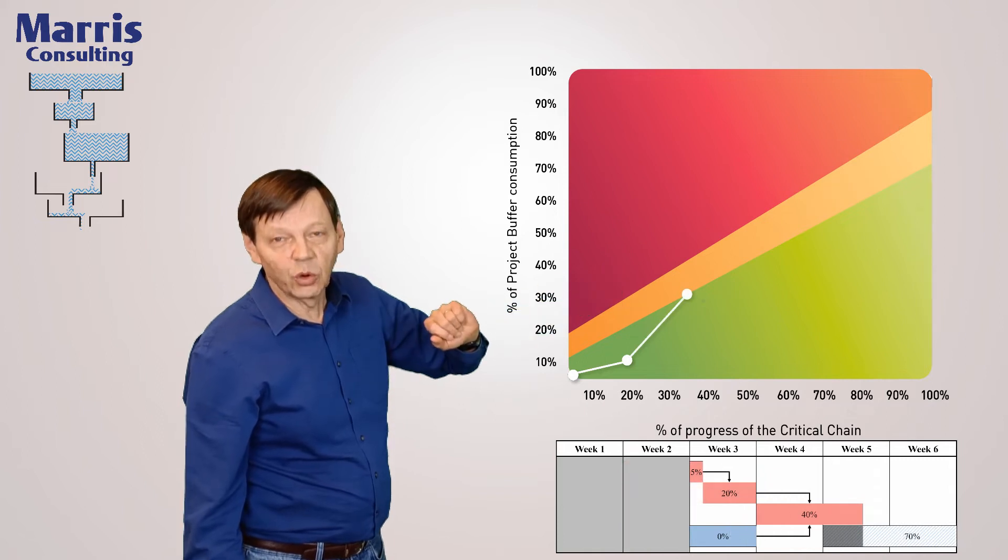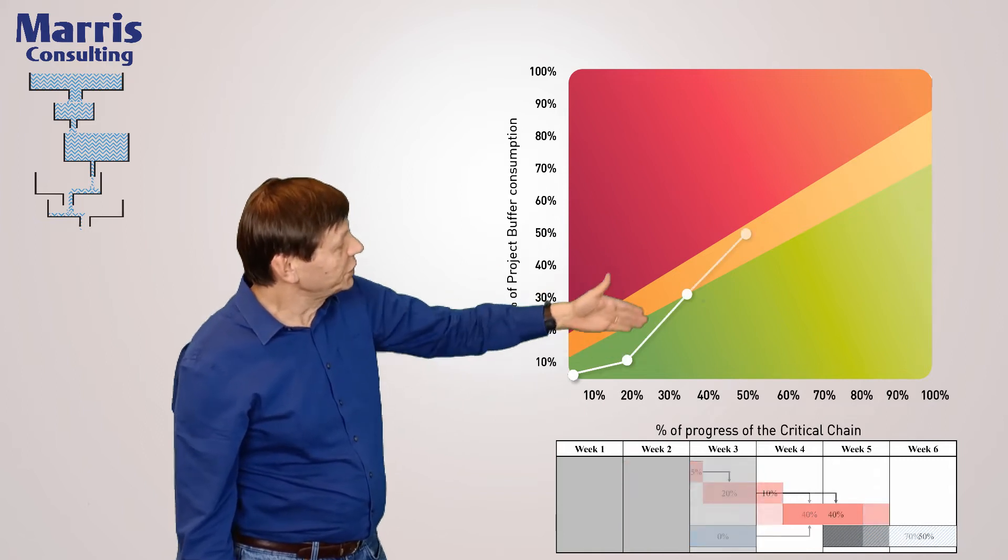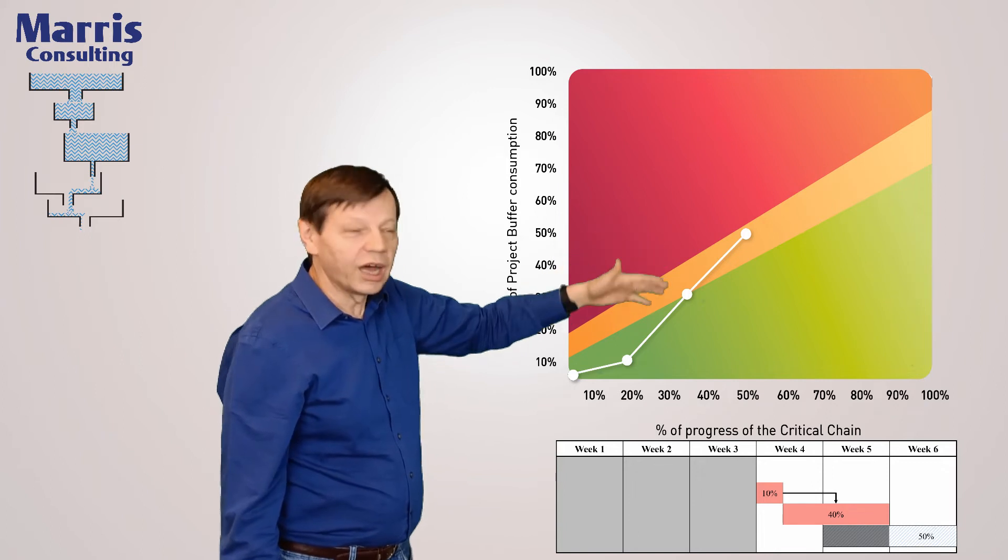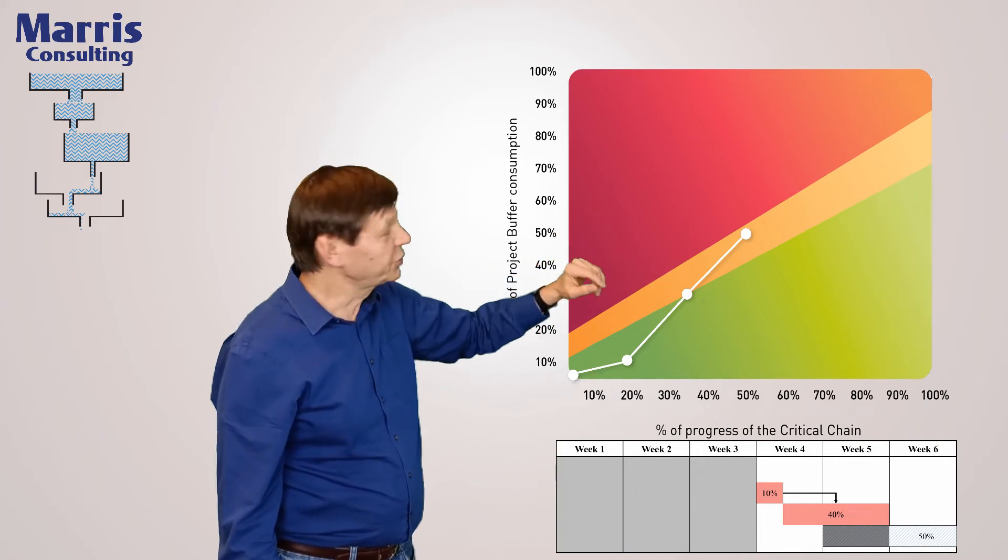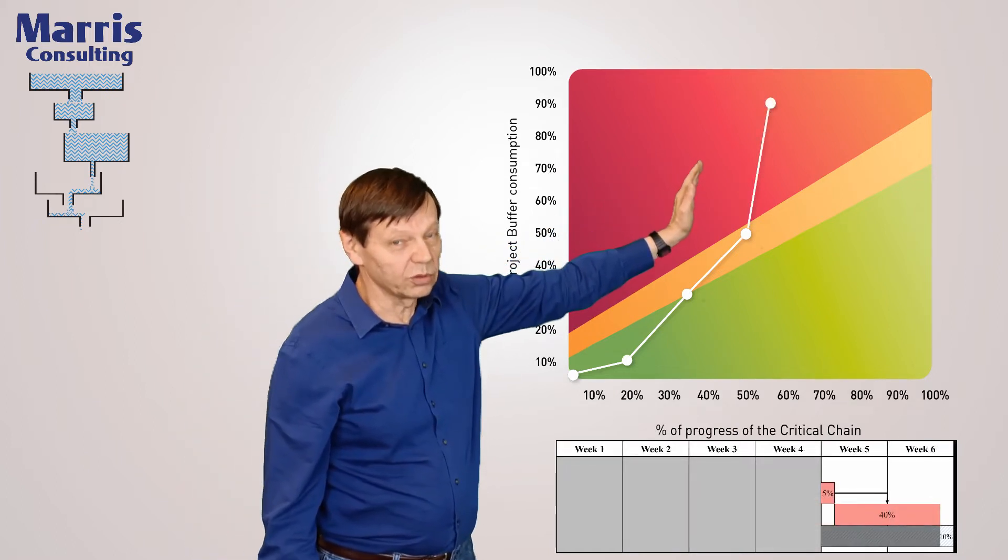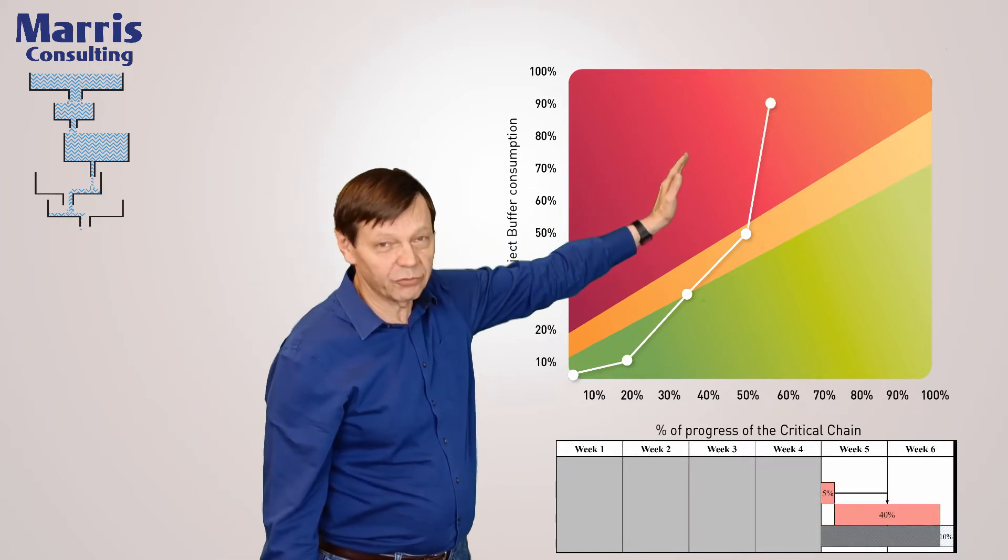Second week, even more consumption of buffer. Third week, further up. We're now getting into the orange and red zone. And on the fourth week, we didn't progress hardly at all and we're way up into the red zone.